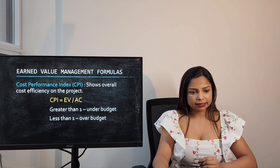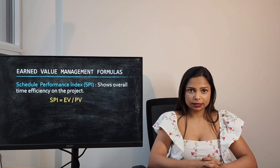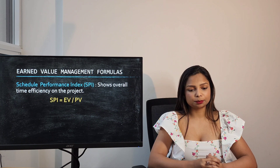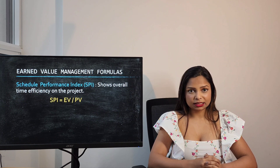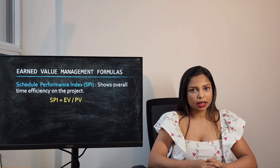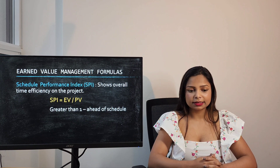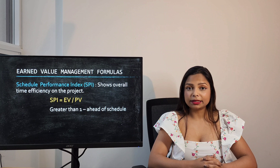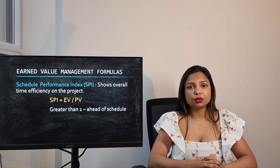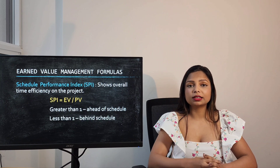Schedule Performance Index, or SPI, shows the overall time efficiency of the project. To calculate SPI you divide Earned Value by Planned Value. If the SPI is greater than 1 your project is ahead of schedule, but if it is less than 1 your project is behind schedule.